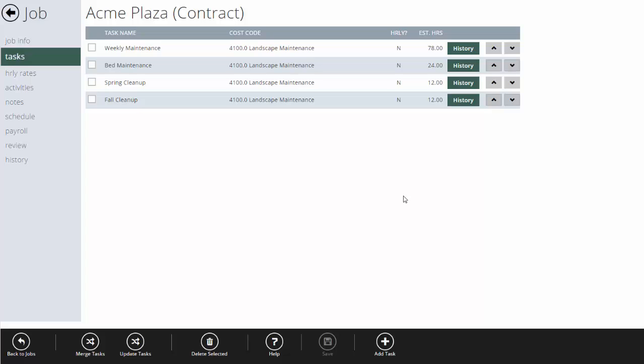You can be really simple with tasks. This is an all-inclusive contract, so I didn't need to break it up — I could have just had one task called 'maintenance' with the total number of hours for the entire season. That would make it easy for the crews to clock into, which is good, but it also wouldn't help very much with estimating. If we were over budget, I wouldn't know whether we took longer to cut the grass, do the cleanups, or do the maintenance — so it's hard to know where you went wrong on your estimate.